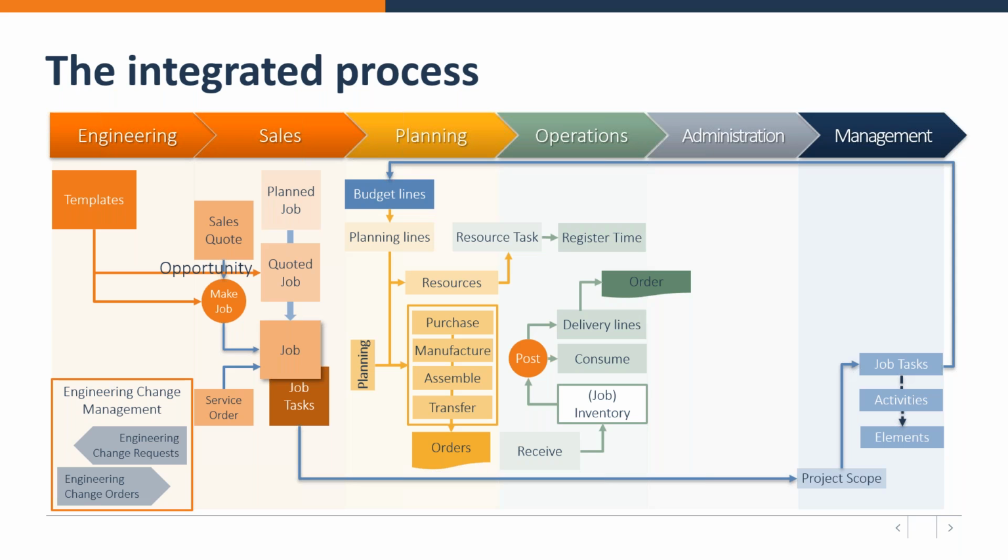As users are going through the manufacturing process and going through the purchasing process, inventory is being increased through your systems. Inventory levels are being increased. And like any other perpetual inventory system, inventory will be consumed. When inventory is consumed into the project, there should be clear visibility into that, and what inventory was consumed and at what point and who did it, and what costs are now accrued, additional costs into the project, which is called generally job project inventory.